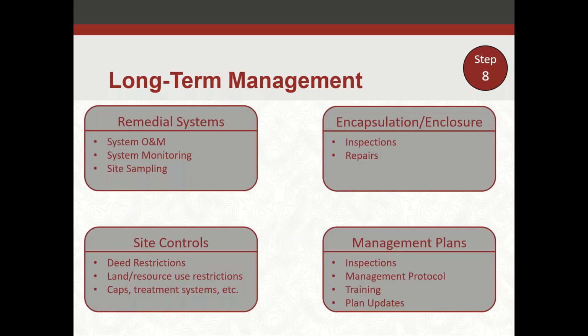All right, our step 8, the final step we're looking at is long-term management. Sometimes you're going to have remediation that does not go the full circle. It's not completed fully. Whether there's obstacles in the way, if you have a building on a site and you can't fully excavate soil, you have depths you can't reach, or if you leave asbestos materials or something in the building, you're doing enclosure, encapsulation, or manage in place, you're going to have things that you've got to deal with on a long-term management basis.